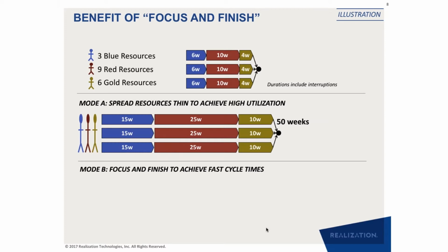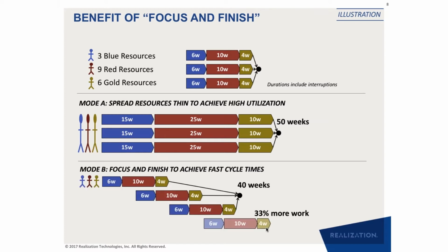Do you have a suggestion for the size of the green versus red sizes? For example, 2/3 green to 1/3 red? Yeah, so it's a slope that you need to define. Normally our implementation teams start the clients with saying, okay, the project is starting, don't turn it red on the first day. So maybe you allow 10% buffer consumption before it turns red in the beginning of the project. Towards the end of the project, you don't want to create panic. If your project is going to be delivered on time, then it is green. So maybe you allow 95% of the buffer to be consumed towards the end of the project before it turns red. And that gives us a good starting point, which gets modified by the clients based on their comfort level.